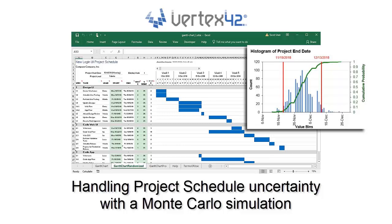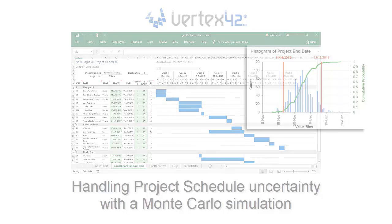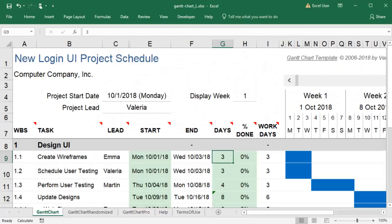A Gantt chart and a Monte Carlo simulation can work together to help me understand when my project will be complete when I have to work with variable estimates.